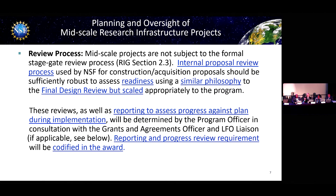The mid-scale review process starts with technical and scientific reviews. The next step is project management and concept of operations review — that's where BFA gets to engage and review those plans developed in accordance with Uniform Guidance, PAPPG, RIG, and the solicitation. This review assesses progress and readiness of projects. Through this process, what we try to do is lower the risk of the project and make sure the project is ready to succeed, so the best projects get selected.